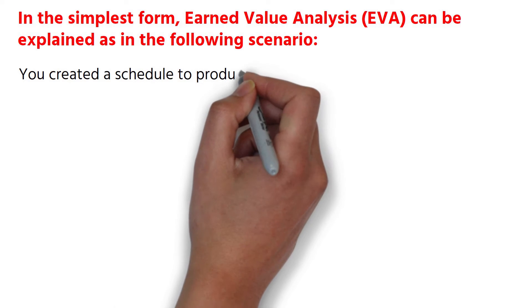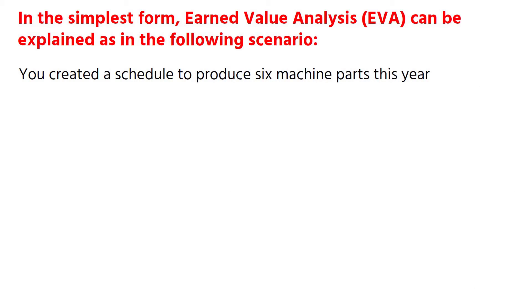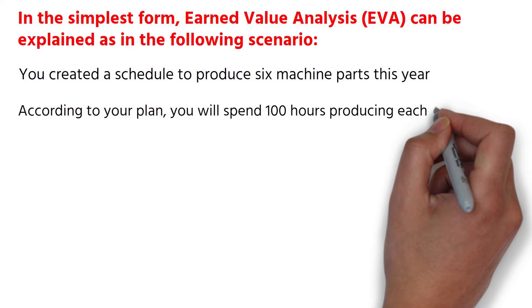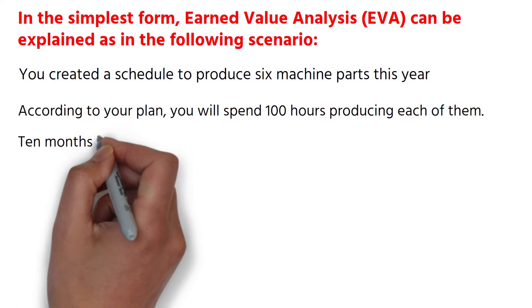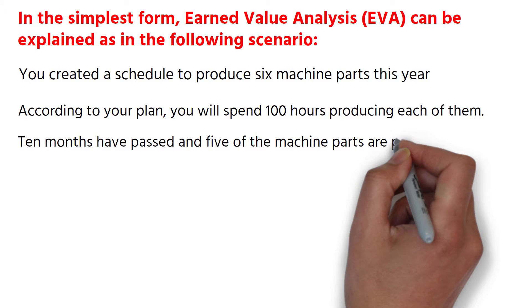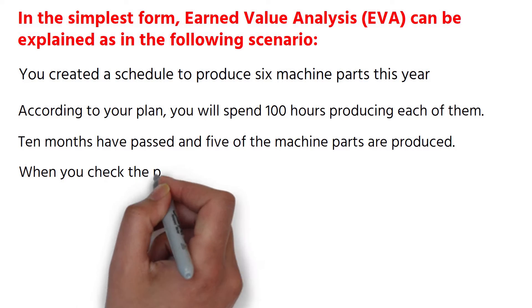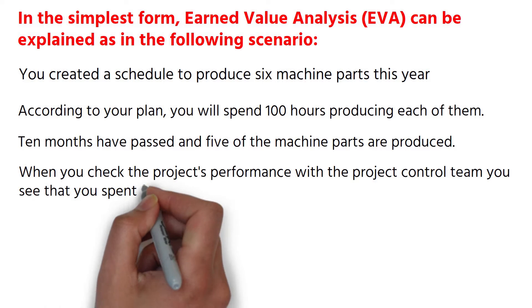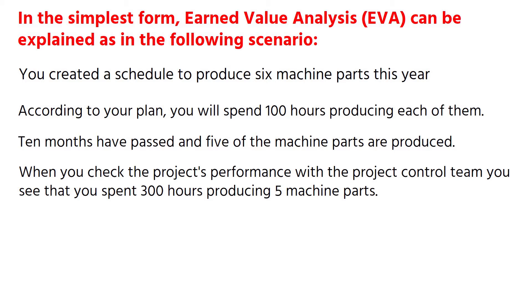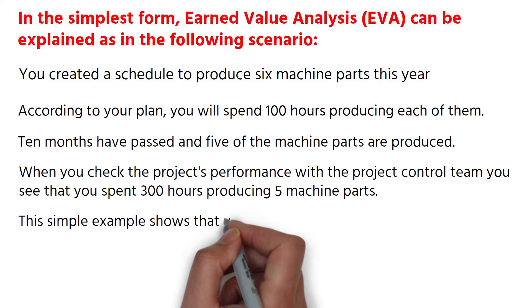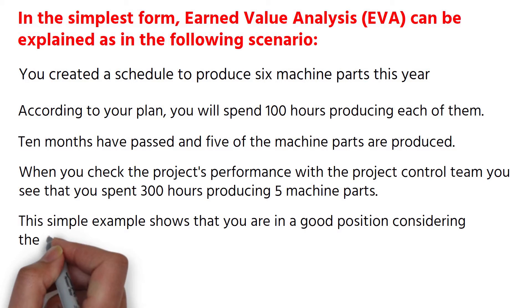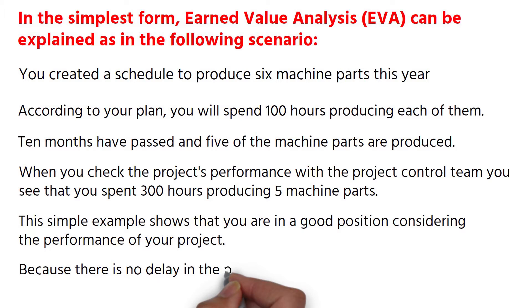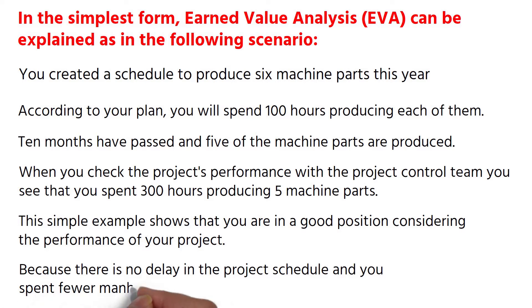You created a schedule to produce 6 machine parts this year. According to your plan, you will spend 100 hours producing each of them. 10 months have passed and 5 of the machine parts are produced. When you check the project's performance with the project control team, you see that you spent 300 hours producing 5 machine parts. This simple example shows that you are in a good position considering the performance of your project, because there is no delay in the project schedule and you spent fewer man hours than planned.